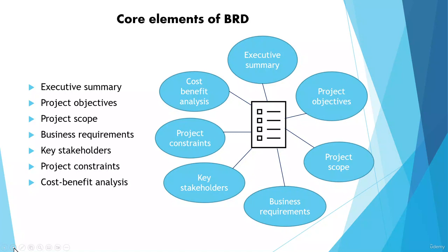So what are the objectives of BRD? It is to gain agreement with the stakeholders, to provide a foundation to communicate the solution needs to satisfy the customers and business needs. It is to provide input into the next phase for this project. It consists of executive summary, project objectives, project scope, business requirements, key stakeholders, project constraints, and cost benefit analysis.